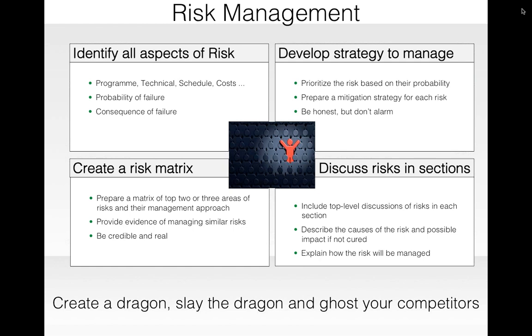So what is suggested is that you prioritize the risks, you identify the most probable risks which are going to happen, and you set them on a high priority, and then you prepare the mitigation plan for these risks. When you prepare the mitigation plan, you are not only saying that if this risk happens, this is what I will do, but you are also showing your preparedness for it, and that is actually an advantage also.